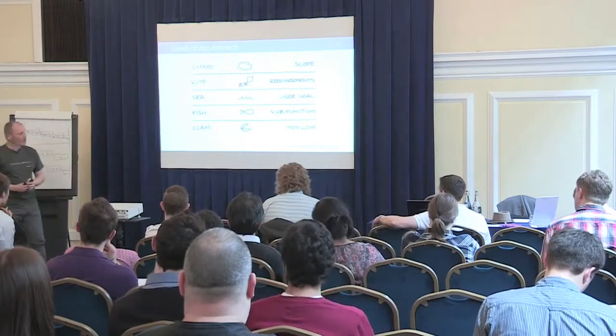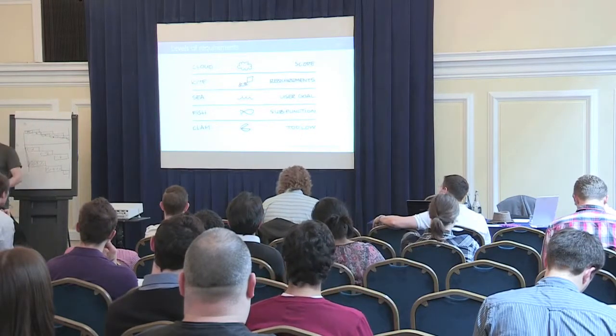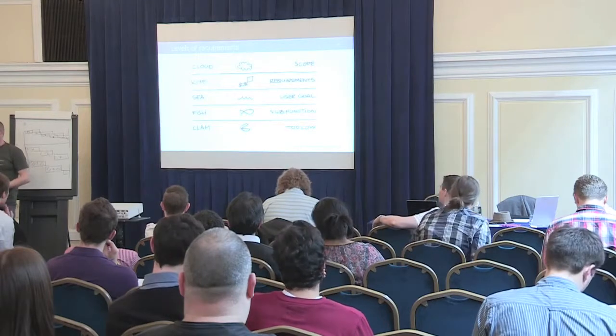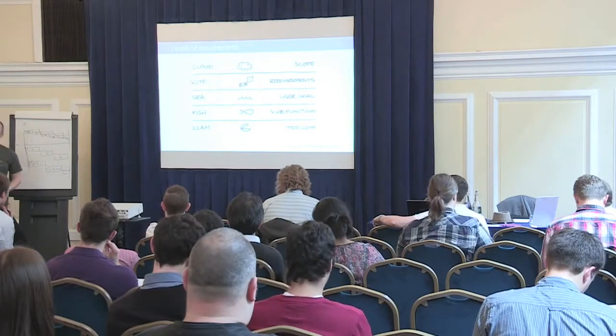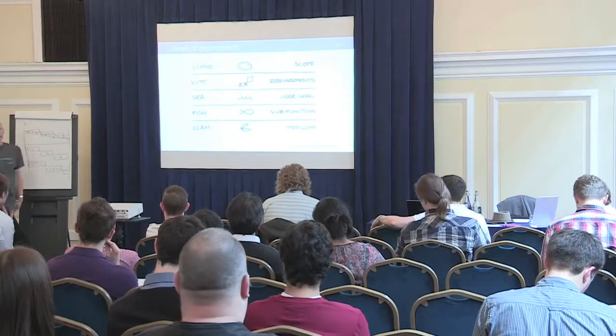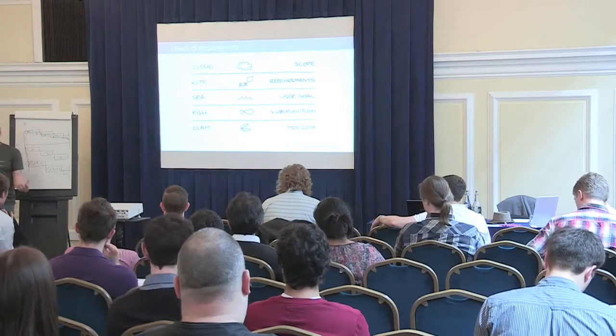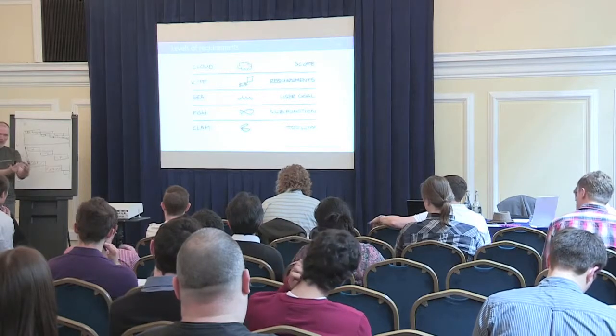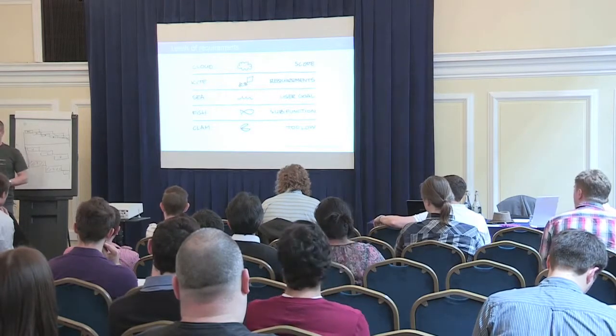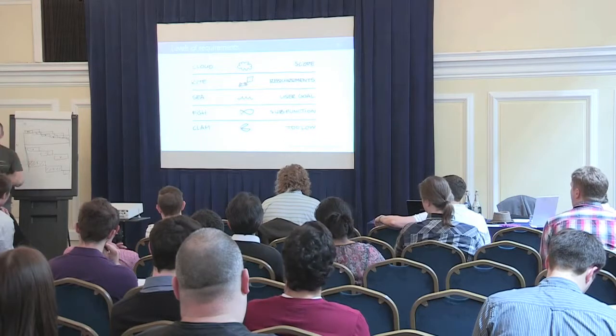Because in an Agile project, you would want to finish your work items within an iteration. So if you have a 2-week iteration, and you have a use case like do the quarterly billing, which took us like 1.5 years to build, by the way, that is not a suitable unit of work for your sprint, right? So you have to break it down again.